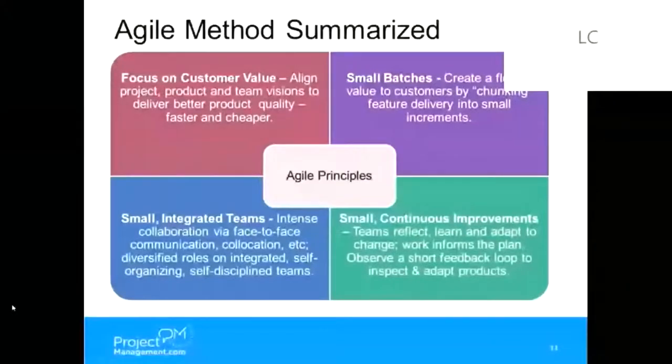One of the principles in Agile that we could incorporate today in our traditional project is the retrospective and the ideas. What are some things we can do that might make ourselves as a team more productive to reduce waste, those agile principles? One of the things that you may be able to implement fairly quickly is that when we do a status call or some sort of stand-up meeting, enforce the 7-second rule. I don't know if you're familiar with the 7-second rule, but it's basically a governance point that if we can't solve this problem in 7 seconds, we're going to defer it to its own meeting.